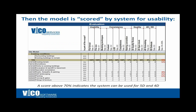The report will have two things: a listing of the scope included and excluded, and a score — with the best score being 100% per system. This example shows site work. Generally, when the score is above 70%, those systems can be used downstream. Some systems come in lower, and we'll want to look at why they're not as suitable and what can be done about them.